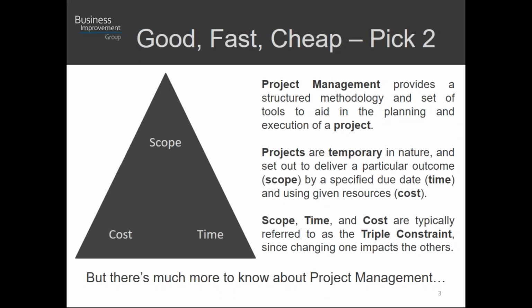Scope, time, and cost in project management circles are typically referred to as the triple constraint, because changing one will impact the other. There is a direct link. And this is why we always say pick two. As a project manager, if the sponsor of your project, or customer, client, what have you, wants a particular scope within a certain amount of time, you're going to have to tell them the cost that's associated with it, right? So they really can't get good, fast, and cheap, right? If they want it good and fast, there's going to be some cost associated with that. And then you can do that exercise for all 3 of these.